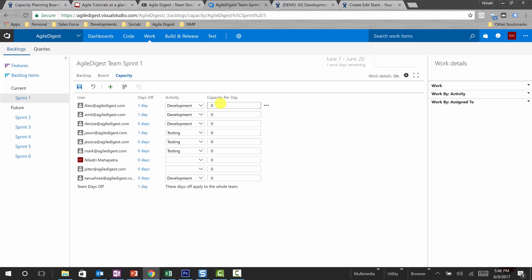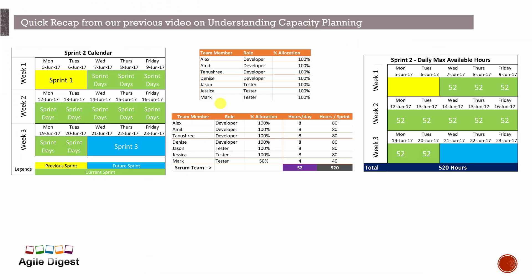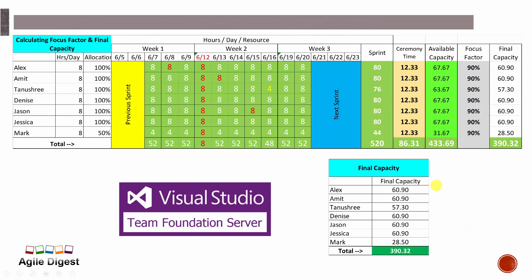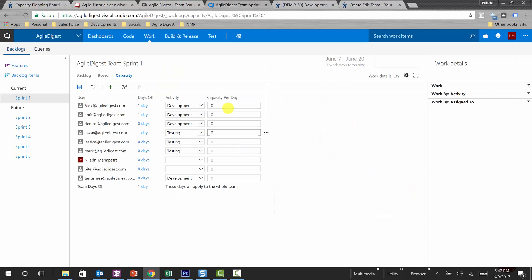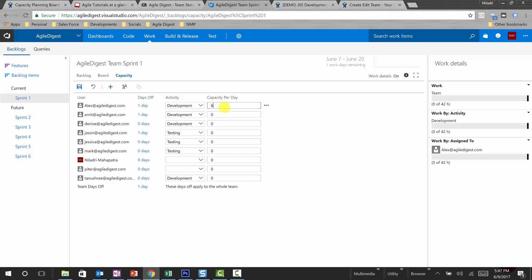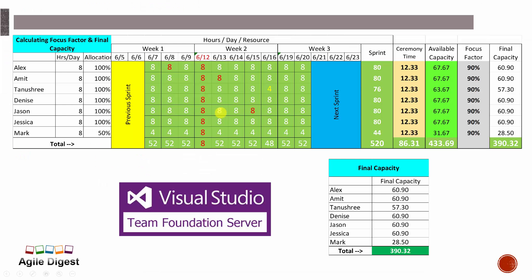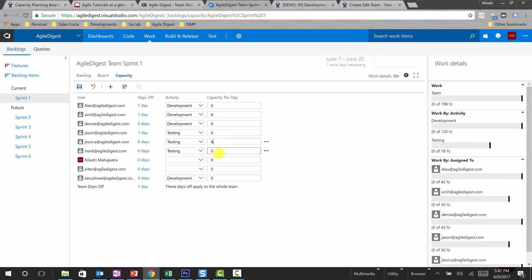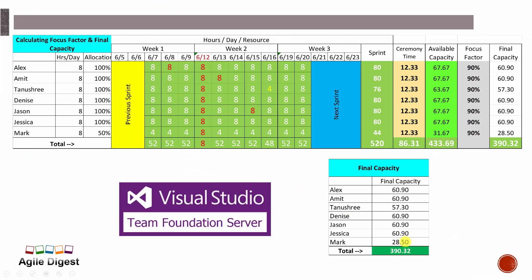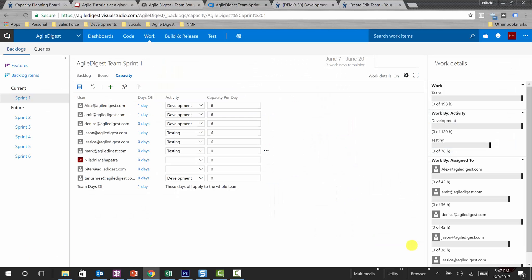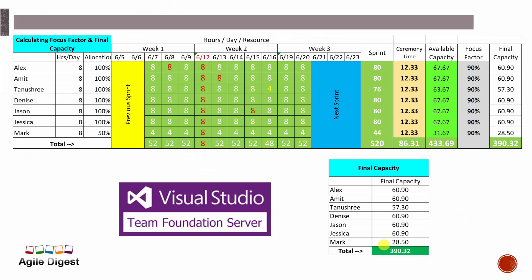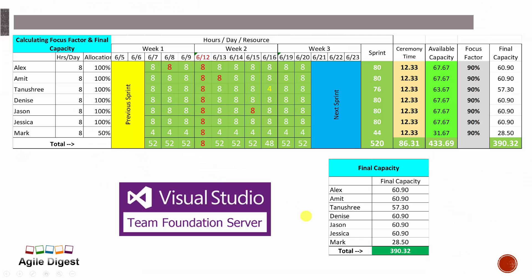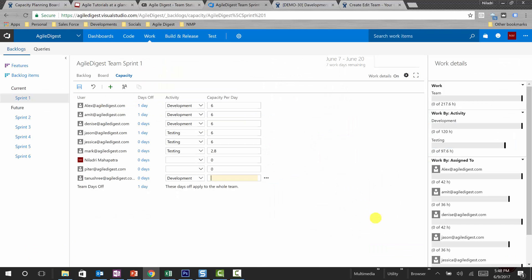Now capacity per day will be putting it. Per day means what we saw here is 60.90, that's for the entire sprint. So for Alex it will be 6 hours, for Amit it will be 6 hours. Mark has 2.8 hours, so Mark was a partial and shared resource, so his capacity will be 2.8 hours. Peter will not be putting any values. Tanushri is 5.7 hours because Tanushri has off for four hours for some day.